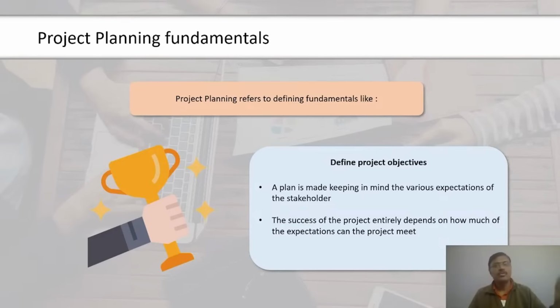The key output of the control schedule process is the work performance information. This is represented in the form of schedule variance, SV, and schedule performance index, SPI. As part of the control schedule process, the project team will generate forecasts, likely schedule for forthcoming activities, and project as a whole. The other outputs include organizational process assets updates, change requests, project management plan updates, and project document updates. In the next screen, let us look into a business scenario to understand this concept better.